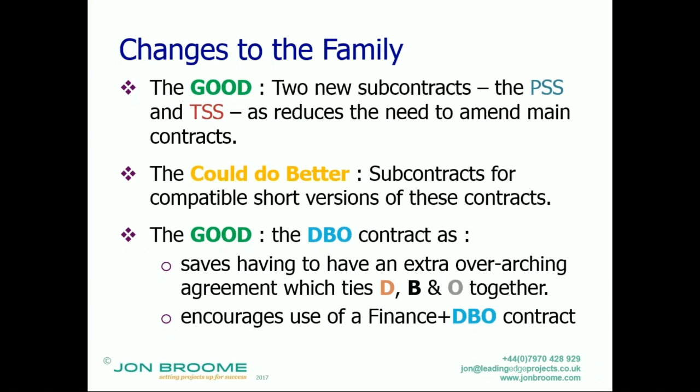So what they have done is they've effectively merged them into one contract. So you can have a DBO contract, design, build, operate. It is not, as written, a DBFO, design, build, finance, operate contract, which is more popularly known as a PFI, or private finance initiative contract.